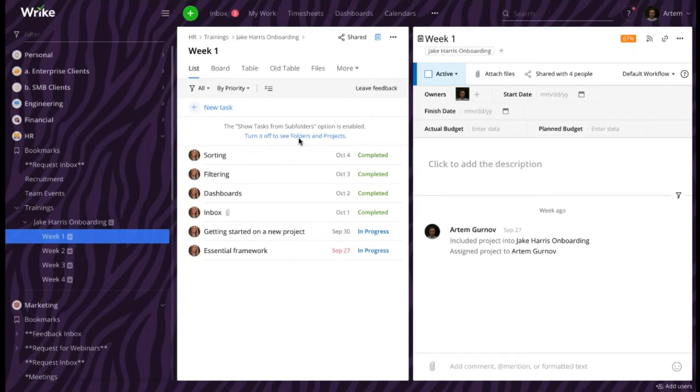Basically, what the add-on allows you to do is enter the value of effort for any given task. So in this case, you could, for example, have a task that has an effort of 6 hours but a duration of 10 days. It means that a certain employee who is responsible for this task would need to spend 6 hours in total at any time during these 10 days.